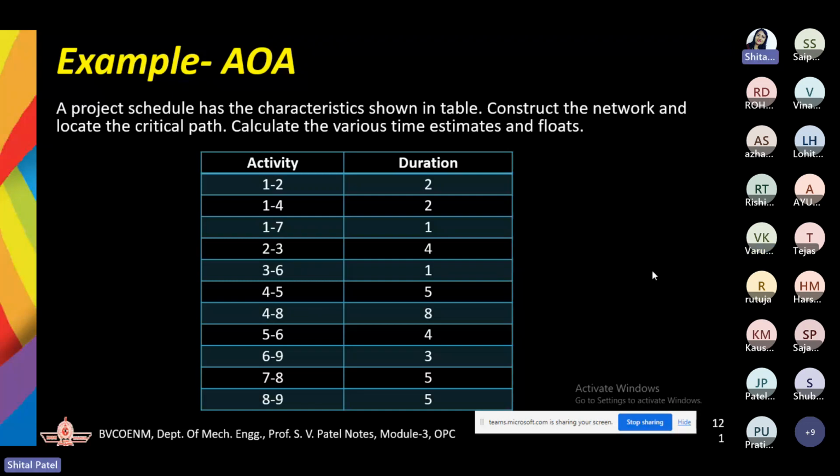Actually, when we are sharing the resources, at that time it is very good for you to have slack time. You cannot delay the activities which are falling on the critical path. Yes, we would prefer to go on the critical path, so there we won't get slack time. No, for the critical path, we don't have slack time. So there we cannot share the resources.